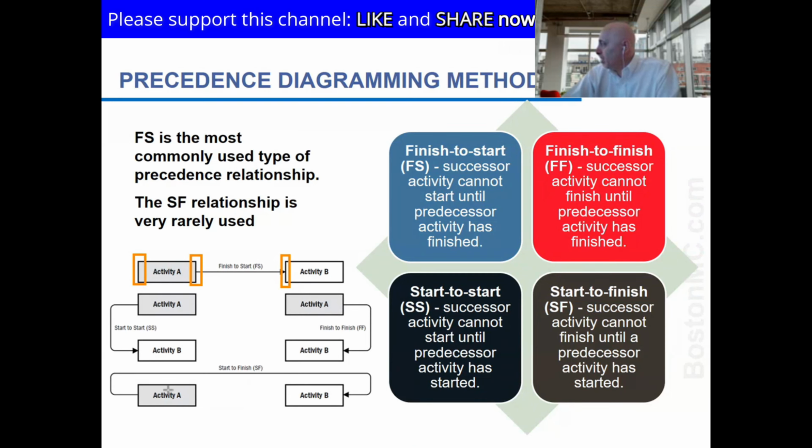And then we have another activity here. This one says start to start. Start to start is saying that this activity has to start before this one can start. It's not the same as both of them starting at the same time. Okay, it's not the same. If this does not start, the one above, activity A, B will not start. So let me show you on the software how this is usually done.